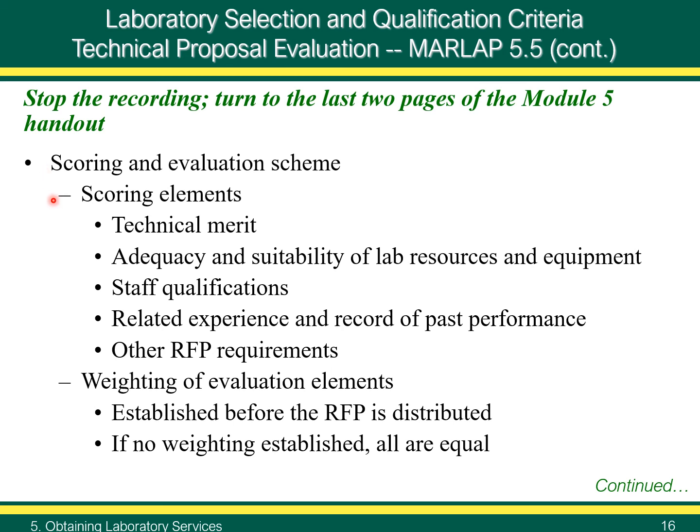The first element is technical merit. The lab's proposal in response to the RFP should include details of the laboratory's quality system and all the analytical methods to be employed by the laboratory, as well as the method validation documentation. The methods should be evaluated against the APSs and MQOs provided in the SOW. Previous performance should be reviewed and scored.